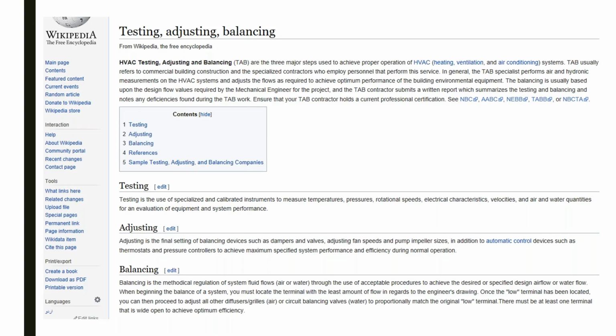You know, there's no focus on improvement on new construction because it's a new building. If you have deficiencies, like you may have seen the list of deficiencies that we were talking about earlier, that was new construction. I expect the contractor to fix those things, call me back so I can come back and check them off the list. But not everybody does that.